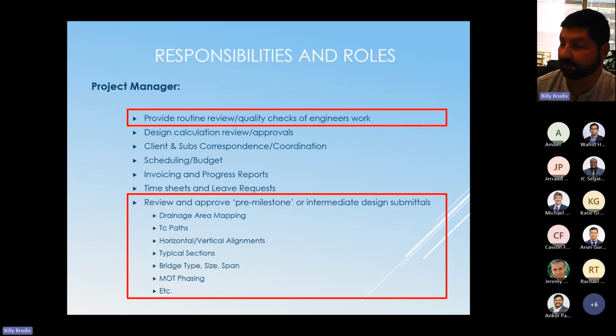The worst thing that we can do is assign work to an engineer and then 40 hours later check in to see where they're at. It's best, and this goes back to the goals, to communicate daily with your engineers, give them guidance, check in on how they're doing, and make sure they're not deviating from the correct path, because in the engineering world, if you go 40 hours in the wrong direction, it's going to take you 80 hours to correct it.